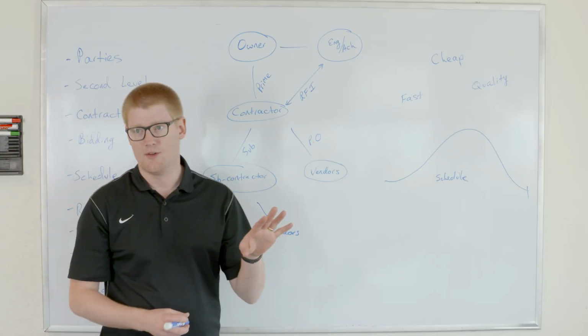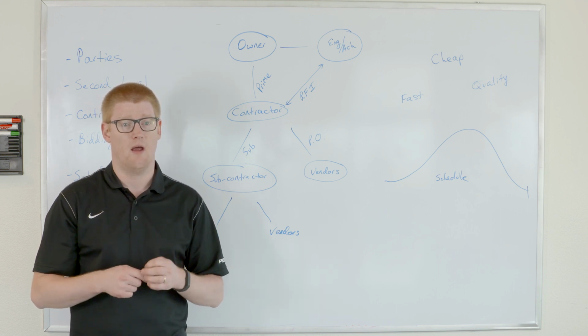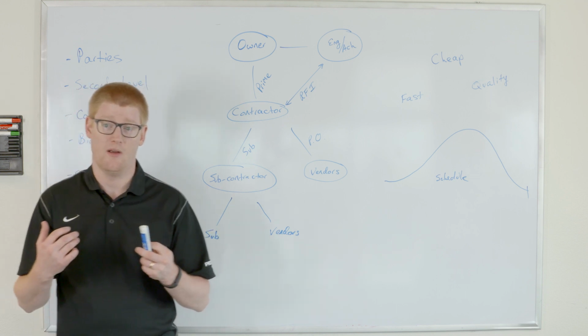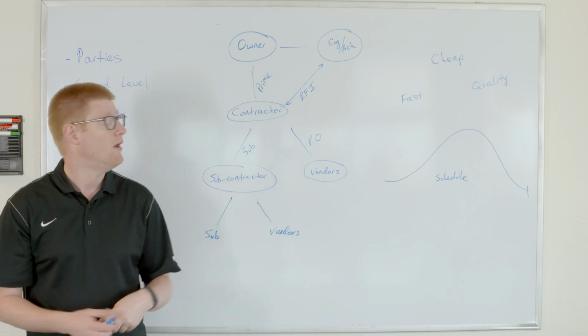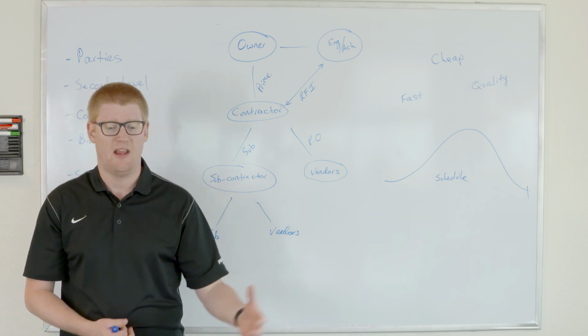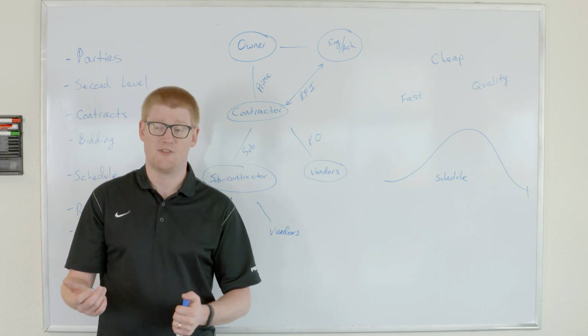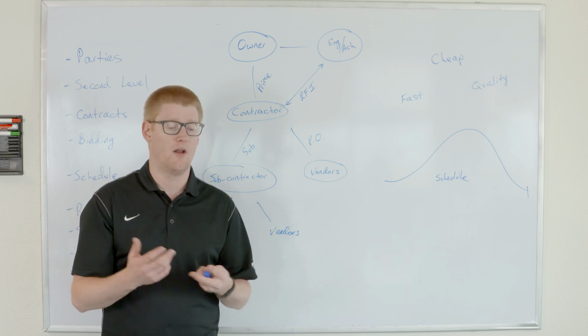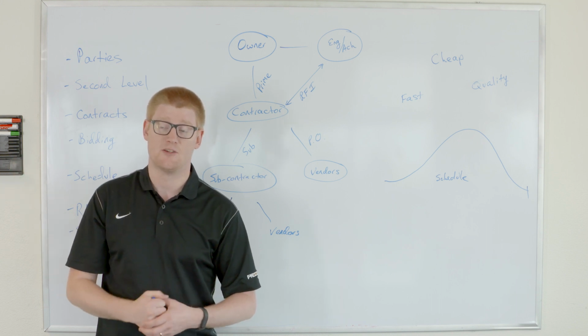Secondly, we have submittals, and that's another huge area of Procore, and it's an area where we have a lot of customizability and areas that can suit many different contractors' needs. But what I'm talking about with the submittal are specifications and getting those approved for whatever gets installed. And by specifications, we're talking about everything on a project, from the concrete mix design to the light in the ceiling has a specification.